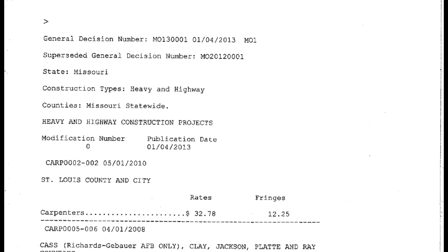And that is one of the main items that gets audited when the state and the federal auditors come down and check our files. And if we don't make sure you pay your employees what you should, we get penalized. So the city and the county and the state all spend a lot of time making sure that we aren't going to get penalized. And what that means is we'll have to go back to federal aid and pay for the work ourselves, and/or sue you to make sure that we get the money that the feds had promised us.